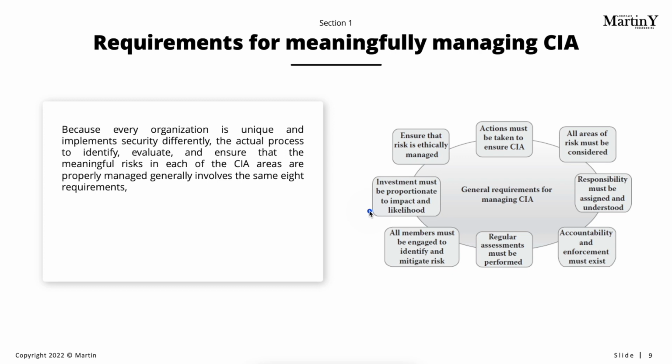Because it is simple: even if that risk grows into an incident, the maximum money that you can lose is $100. However, if you invest into risk management, you might lose more money than an actual incident will cost you. So in that case, there is absolutely no point in investing in managing this risk.